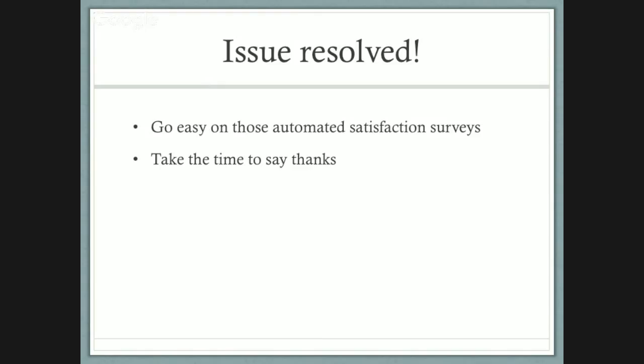I don't know how other shops do it, but we charge our clients based on timekeeping associated with these bugs. So it gets really confusing. Like, how come you spent 6 hours on this? It doesn't seem like a 6-hour problem. Well, she kept asking for more things in the same ticket, and it needs to be really clear when it's time to open a new ticket. For us, people mostly interact with the tool by email, and I don't have a good way to redirect them into a new email other than saying at some point we just can't answer.